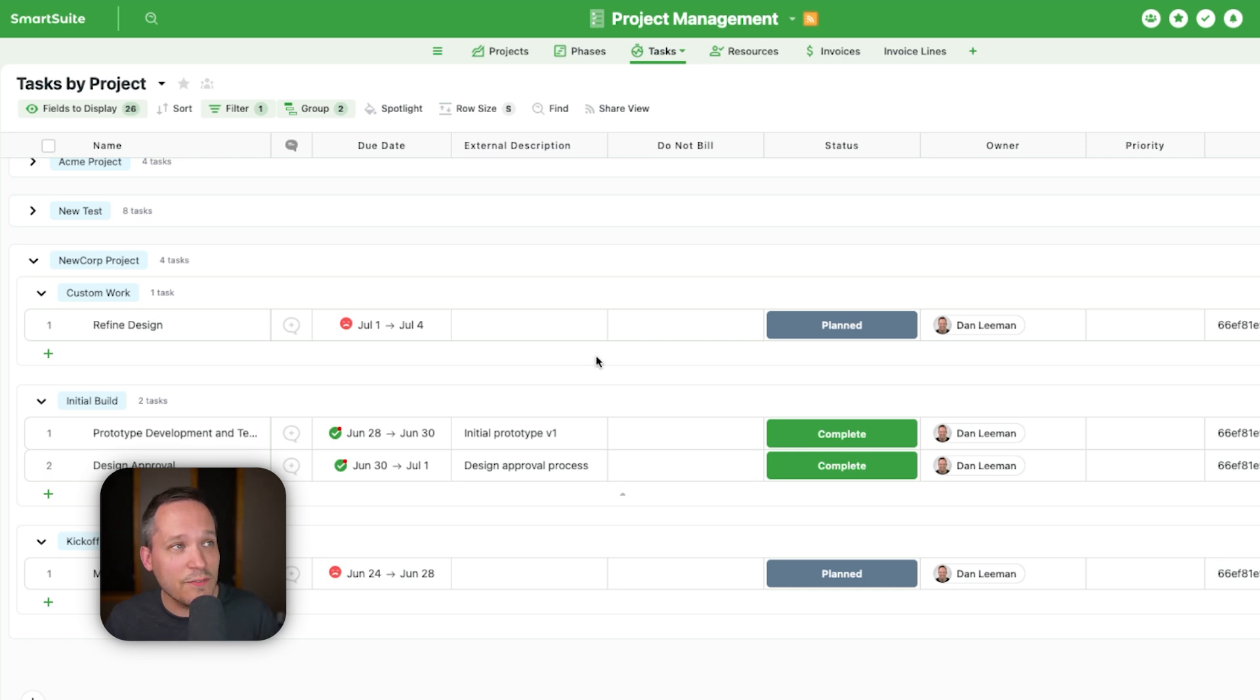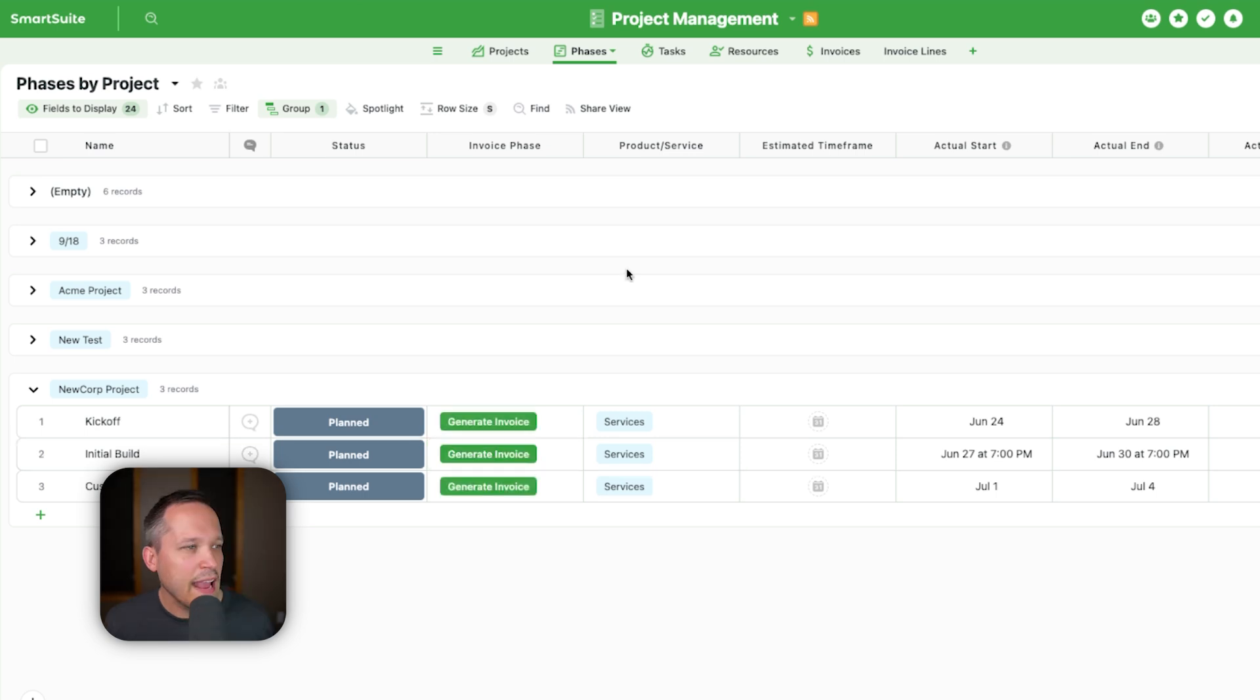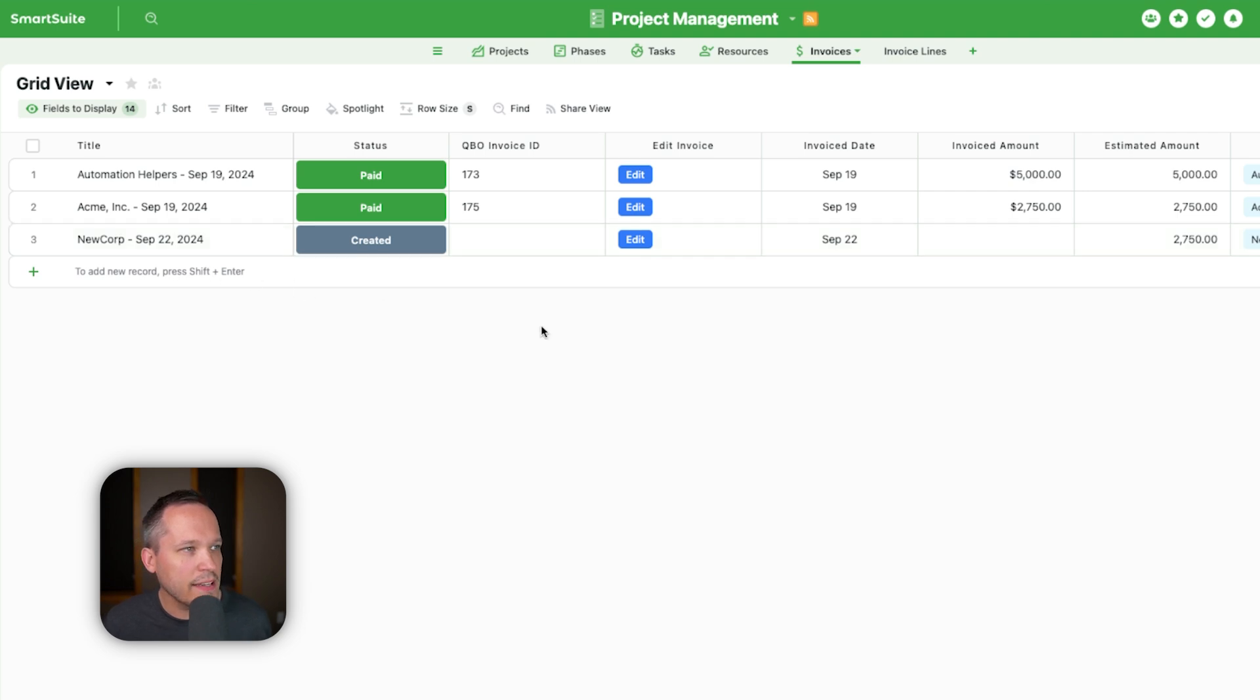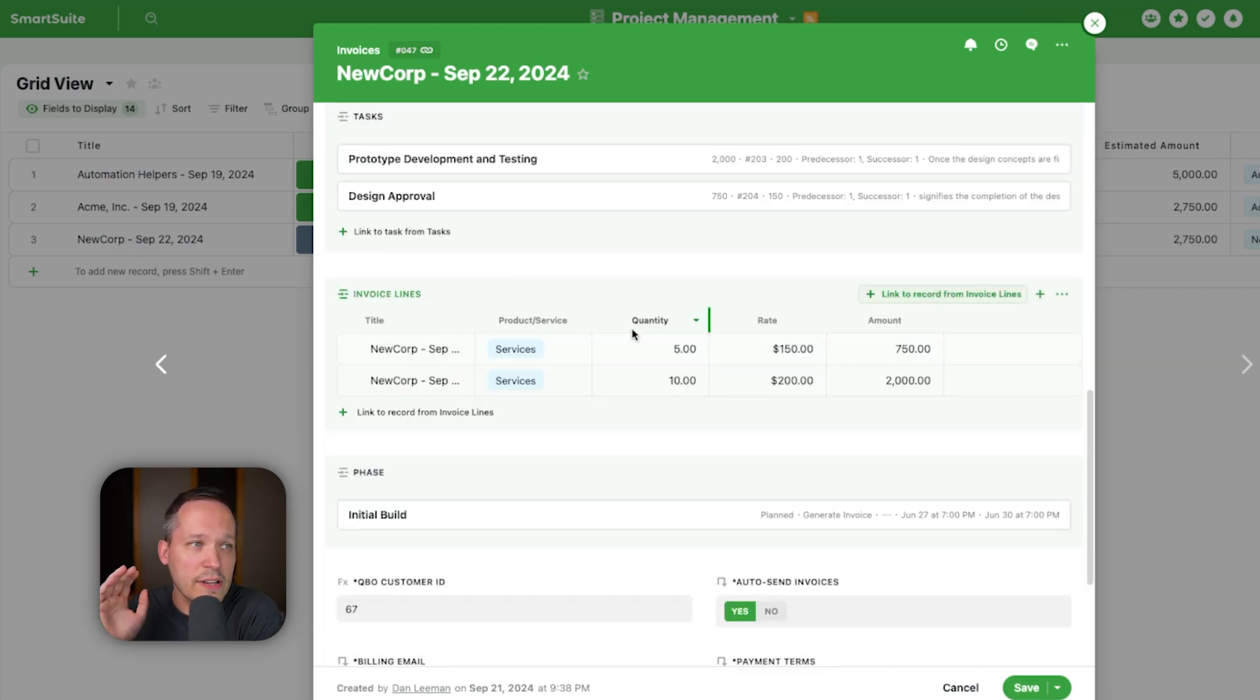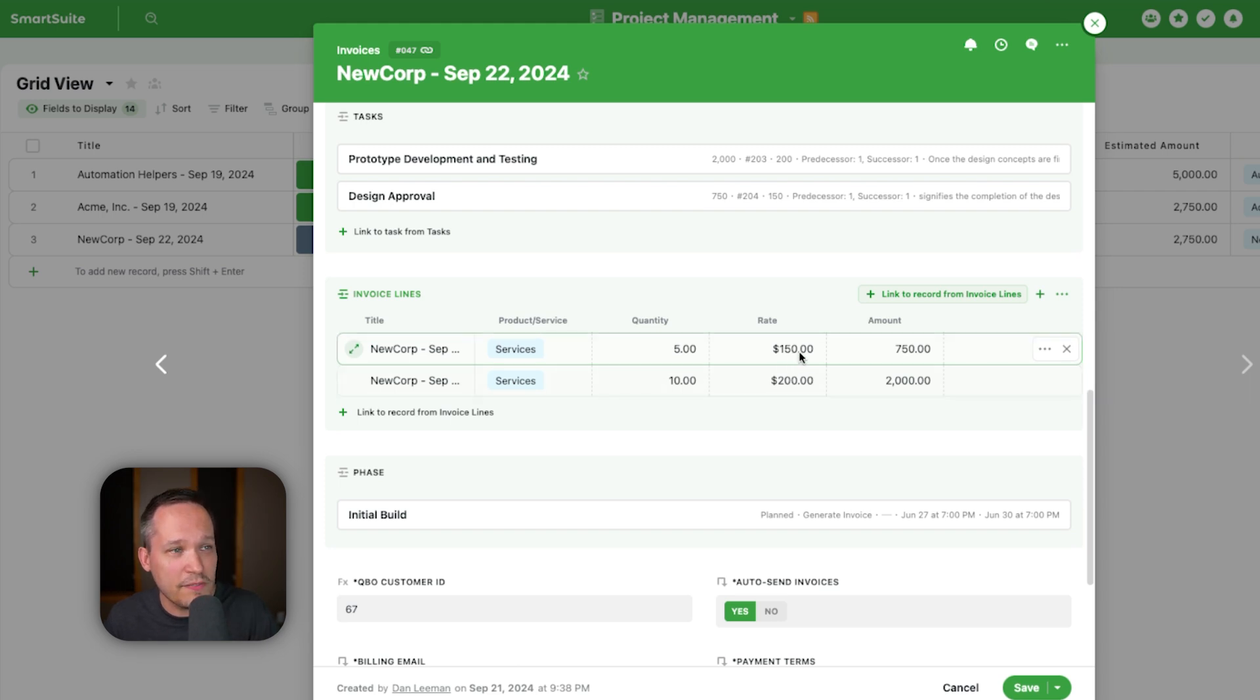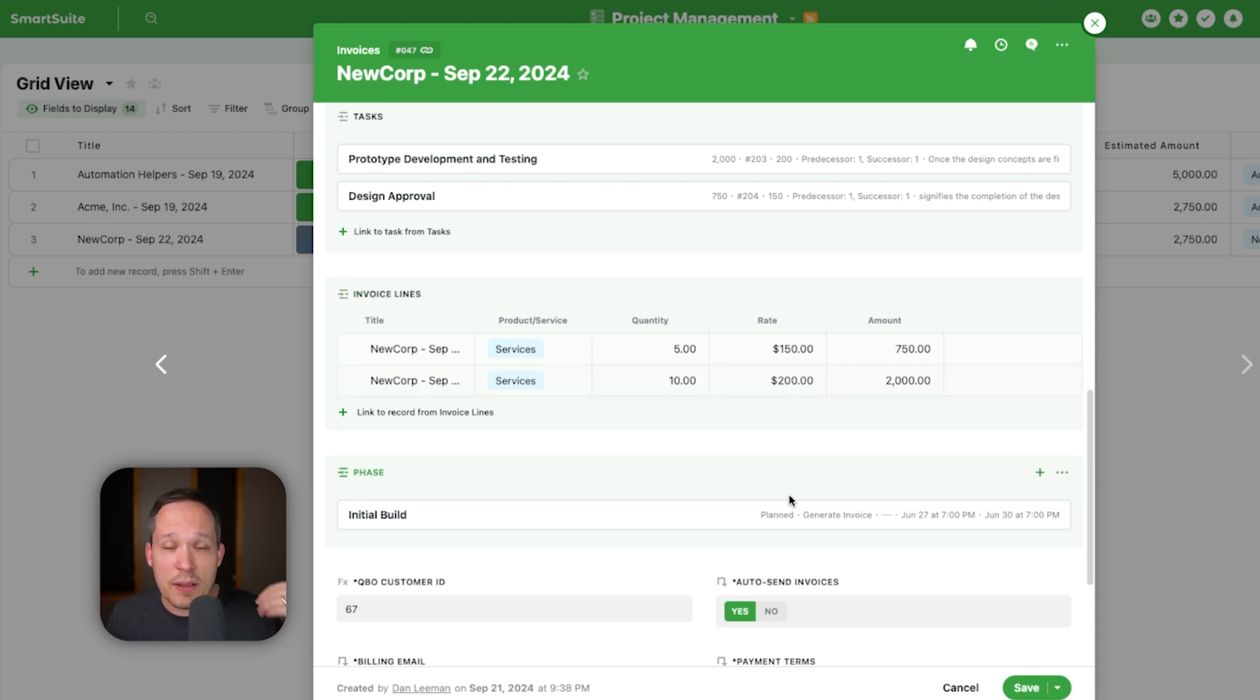So now when it comes to actually invoicing these clients, the important part here is that we need to make sure that our tasks that we want to bill for are marked as complete because this is going to signal to the system it's okay to bill these tasks. They're not in progress, we don't want them shifted to another week. So when we're ready to invoice these, I'm going to do them at the phase level, then we're going to go ahead and generate that invoice. It's going to look at all of the tasks that we have that are currently complete. So let me go ahead and click this. And now if we click over on our invoices we can see this has created a new invoice with today's date and with the client that we're invoicing. And so if I actually expand this record, let me show you some of the fields with this. The most important part here is that this is supporting different invoice lines. Because we had two different bill rates, we had $150 and $200 an hour, it now aggregated those tasks. So we could have 25 different tasks and it might only have one line item. It really just comes down to if we're putting a different service or product on those line items.